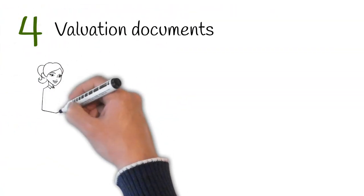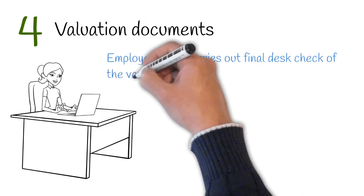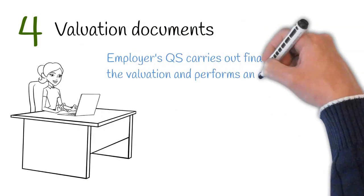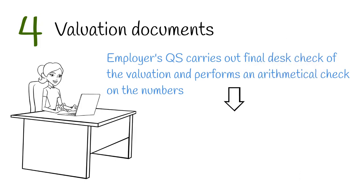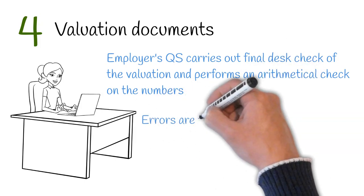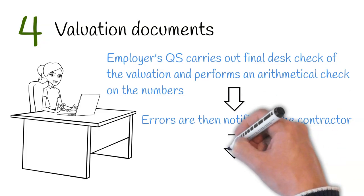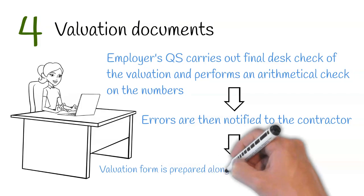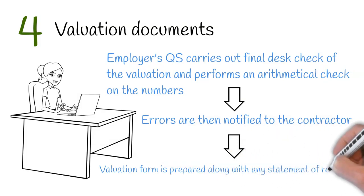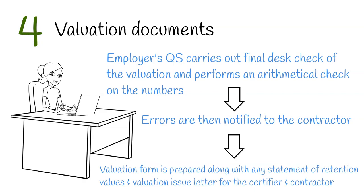Stage 4: Valuation Documents. This is where the employer's quantity surveyor will carry out a final desk check on the valuation and perform arithmetical checks. Any errors are then notified to the contractor. Once the employer's QS is content with the valuation, they will prepare the valuation form along with any statement of retention values, and prepare the valuation issue letter for the certifier and contractor.